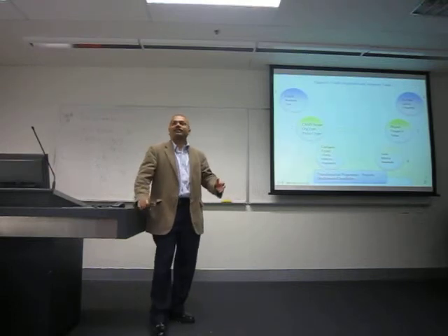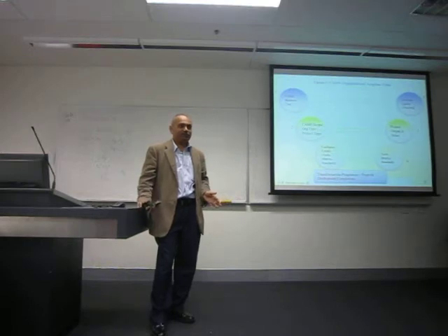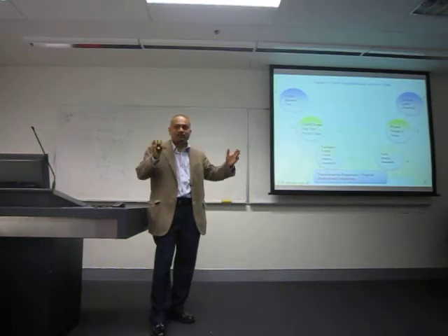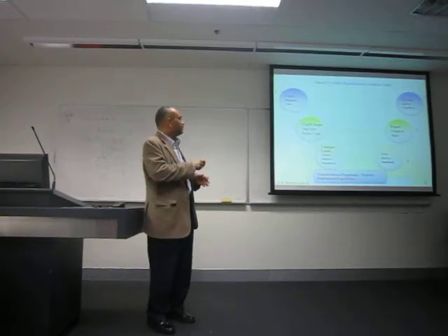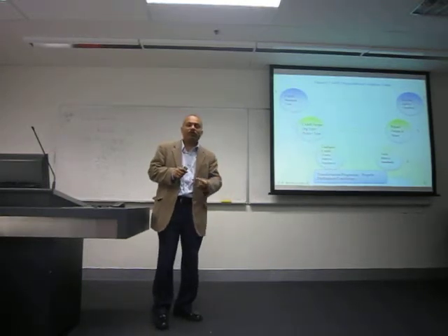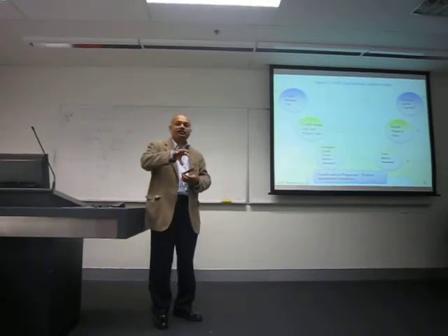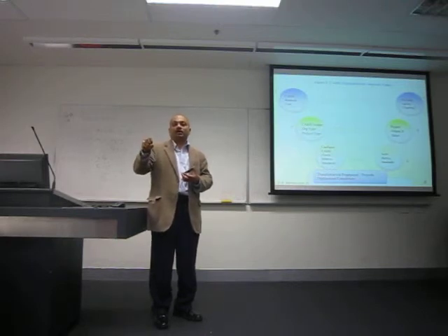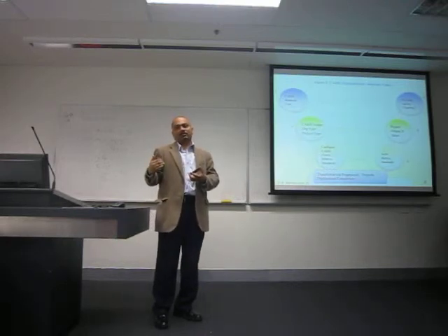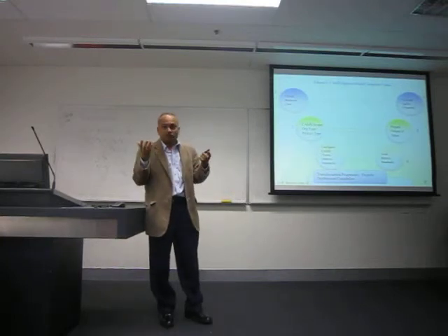But you still can't say, I'm going to change the whole organization today. So you're going to say which areas of the organization you want to approach first. So you scope that out, and that will depend on the type of the organization and the product and service being offered, and the business transformation program will actually produce a series of projects. You can even have up to 500 projects in one large business transformation program.